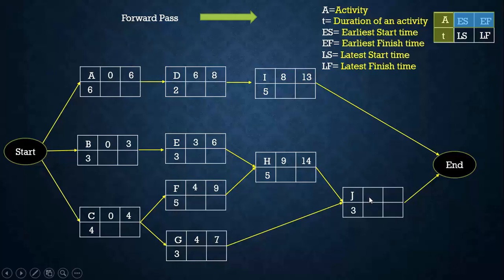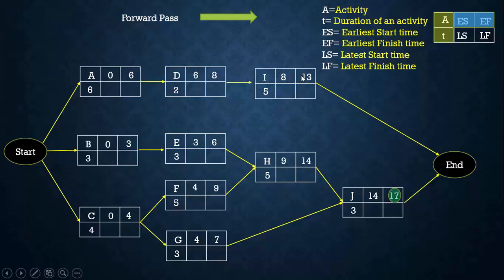For activity J, it needs input from both H and G — two preceding activities. We choose the maximum of 14 and 7 for the earliest start time of J, which is 14. The earliest finish time of J is 14 plus 3, which is 17. We have two tail-end activities with no successors: I and J. The maximum of their earliest finish times — 13 and 17 — is selected as the project duration, which is 17 days.